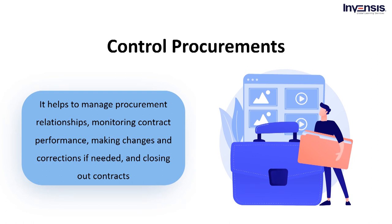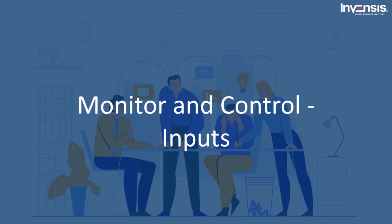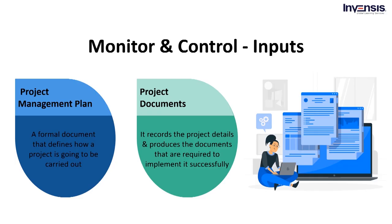Now that we have discussed the monitor and control group processes in detail, let us discuss the inputs, tools, techniques, and outputs involved in monitoring and controlling the project work process. The first input is the project management plan. The project management plan is a formal document that defines how a project will be carried out. The subsidiary plans and project baselines form the foundation for controlling the project, and a project management plan involves focusing on all subjects of the project.